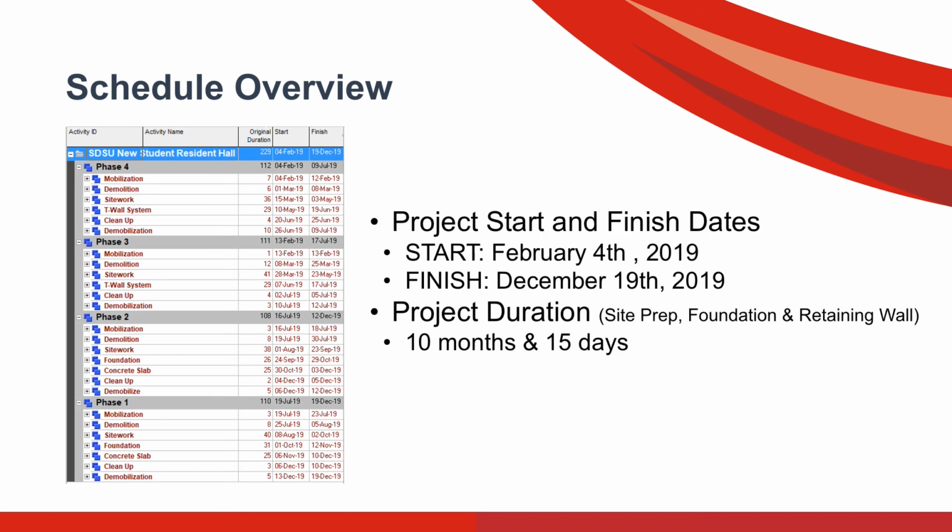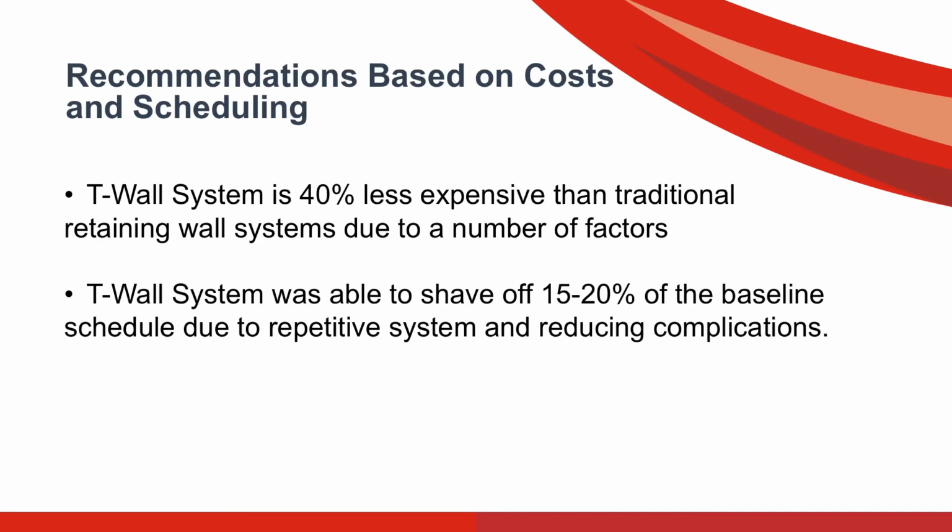The SDSU Residence Hall project will start on February 4th, 2019 and has an expected finish date of December 19, 2019. The project duration for the whole project, which includes the site prep, foundation, and retaining wall, is 10 months and 15 days. After analyzing the cost and schedule for the project, a few recommendations have been made. A T-wall system is 40% less expensive than traditional retaining wall systems due to a number of factors, such as the labor cost, material cost, and fewer activities on the schedule.